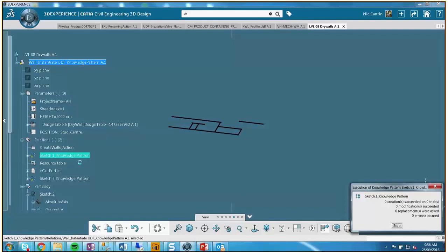So maybe I'll say too, from the first project you saw Tallwood there, where Brockcom is, this first time we really had a use case where we needed to detail every stud, and we did it one by one manually. Basically, it took like over a week. It was super painful and long. We said, okay, we're not going to do this again. So then we built a wall tool, which, as you kind of saw in the model, was this one line as an input, creates the geometry, and then you have different parameters.